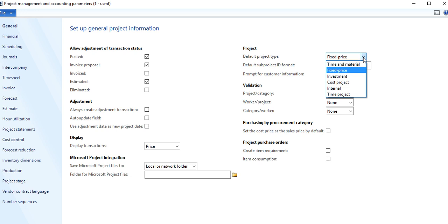But at the same time, there is no control on the cost invested in this. Because of no control on the cost, there may be a possibility that, revenue being fixed, cost may go up. The result may be that the project may end in a loss situation.